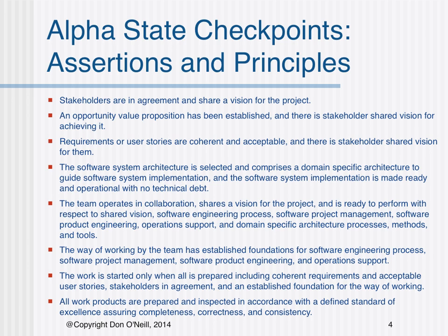Number four, the software system architecture is selected and comprises a domain-specific architecture to guide software system implementation, and the software system implementation is made ready and operational with no technical debt. Number five, the team operates in collaboration, shares a vision for the project, and is ready to perform with respect to shared vision, software engineering process, software project management, software product engineering, operation support, and domain-specific architecture processes, methods, and tools.